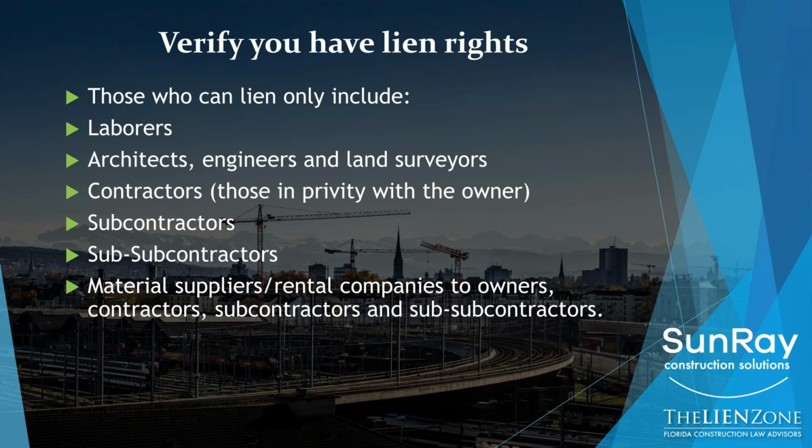Sub-subcontractors. And now we get to the bottom rung of those that have lien rights, meaning anyone below these folks in the chain of contract no longer have lien rights. So material suppliers or rental companies to owners, contractors, subcontractors, and sub-subcontractors, they have lien rights as well. So for example, I may be a shoring supplier. I provide scaffolding and shoring on a project, and if my contract is with the subcontractor, I still have lien rights on that job. If I'm the plumbing supply house and my contract is with the subcontractor, and all I do is deliver materials, then I also have lien rights.